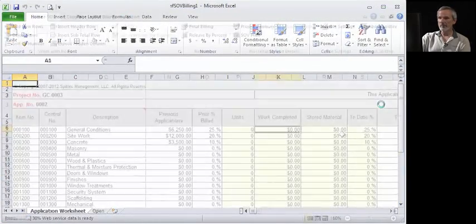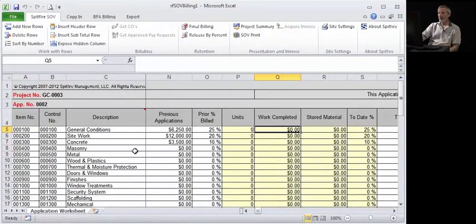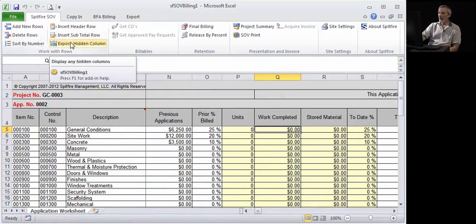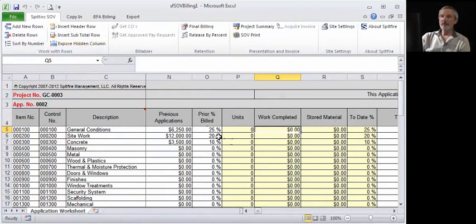And then, just like a budgeting tool was in Excel, we have our progress billing tool also done in Excel. It opens up, and the schedule of values from this project is displayed. We have some amounts that have been previously paid, 25% already, 10%. I have lots more columns I could work with, and we can see how several of these lines have already been paid in the prior month.